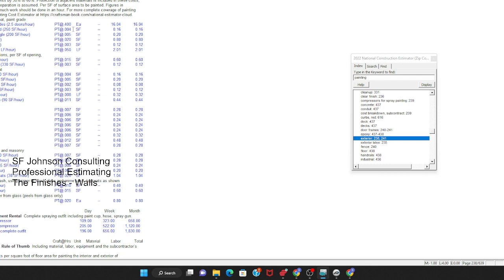So whatever it gives you, that's assuming one person is doing it. So if you got 2 people, that's 16-hour days, okay? If you've got 3 people, 3 times 8, 24 hours you're going to use in a day to do it, any job. That's how we determine our work breakdown schedules and our construction schedules.